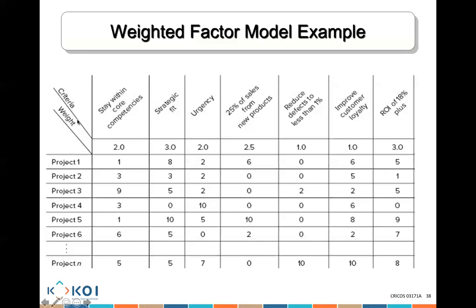Then you say, what is the weight? The weight is how important each criterion is. Criterion: stay within core competency. How important? The weight is 2. Strategic fit, how important? 3. Reduce defects, how important? 1. Improve loyalty, how important? 1.